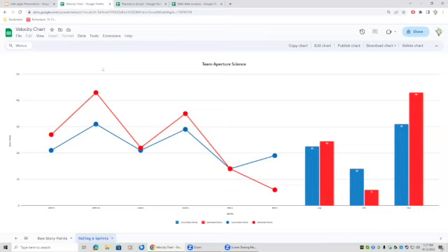Anyway, just a comment. That's a great point, Mike, because some of the work that I'm doing now is we are trying to quantify, give some statistics that we can track on unplanned work. So if you think back to that very first chart that I showed, the little simple Gantt chart, and we're showing some unplanned work down at the bottom. We're not showing how that work is relative to the actual planned or delivered work. So yeah, and you're already collecting all the numbers that you need to calculate that, because if it's your Scrum Master's responsibility to collect those numbers, make them identify which points were in the original plan. That's your say-do ratio. That's the one that you want really good.